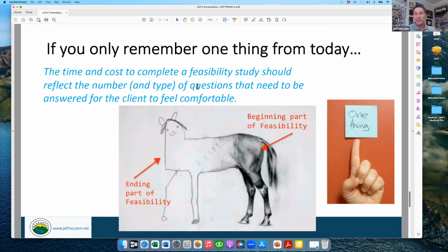Once I get that information, I can figure out how sure we are that we can do what we want to do without some fatal flaw. And with limited feasibility time, we may not know. Some people spend zero on feasibility. They don't want to spend that money. But I told you about my time. Feasibility for a vacant lot will typically run somewhere between $1,000 and $10,000 for all the reports. Not all are necessary, and not all lots are the same.